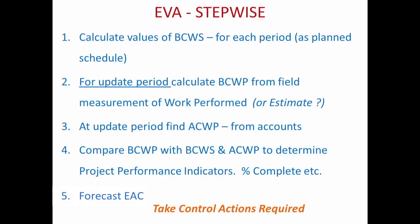Looking at earned value in a step-wise way: the first step is to calculate the budgeted cost of work scheduled (BCWS) for each period. From the bar chart, we take a month-wise planned cost at each month to plot the S curve as well as the monthly expenditure which is the BCWS.